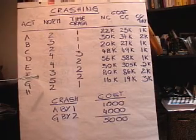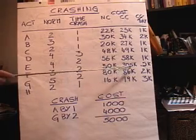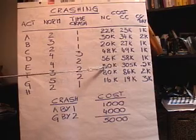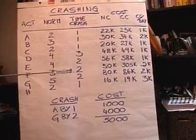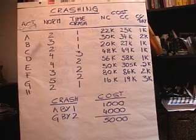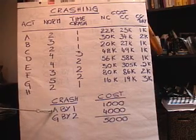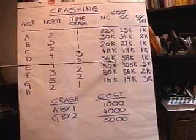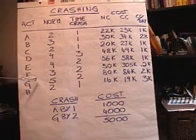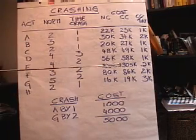Notice activity F: we can take it from three days down to two. The crash cost is $30,500 and the normal cost is $30,000, so that extra crash cost per day is only $500. Now we have to decide which activity to crash to get from 15 days down to 12. Even though F is cheaper, F is not on the critical path, so it doesn't help us to crash that. We want to look at A, C, E, G, or H and decide which ones are cheapest.